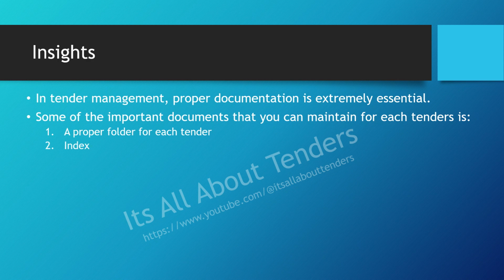Then I prepare an index. The first thing I do after I get a tender is prepare an index. It's very important as it highlights each requirement of a tender: when and where to submit, what to submit, and what timelines to follow. It gives a proper detailed explanation of a particular tender.